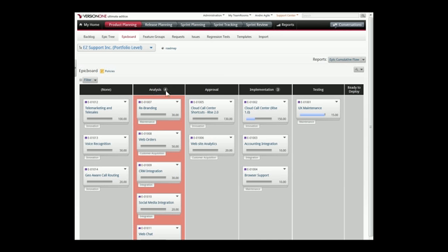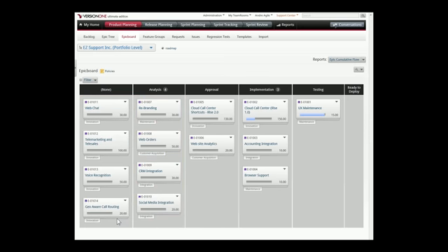So here, analysis has a WIP limit that's been identified of 4. So maybe the organization is always kind of jumping into analysis because, hey, this is the next new thing, without considering that, well, that's going to put constraint and ask a lot of questions of the development organization and remove their focus away from implementation. So if we said, well, okay, we can wait on web chat, we're not going to do that right away, we can move that back out of analysis so we're focused on making sure that we're doing analysis on just the items we want.